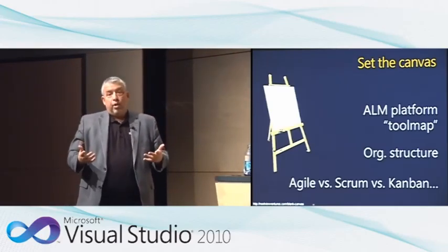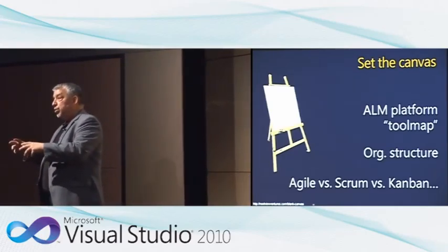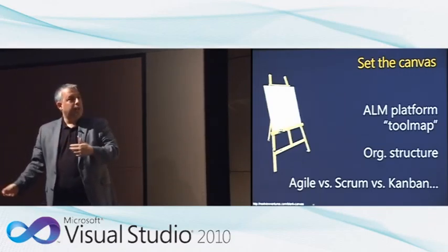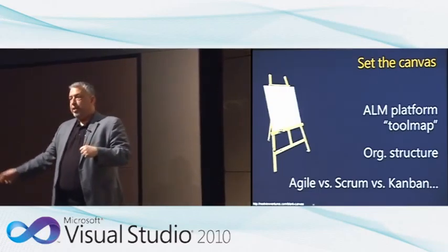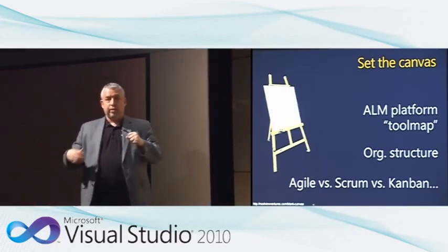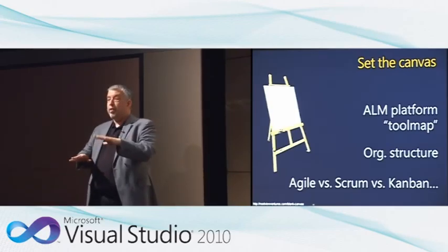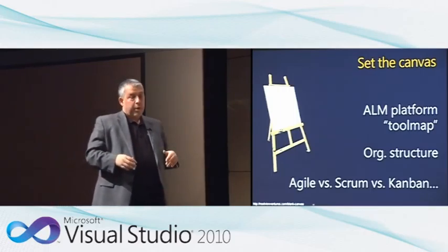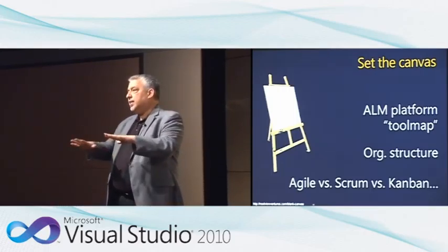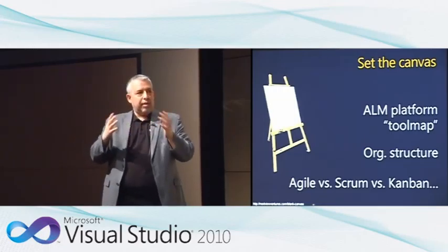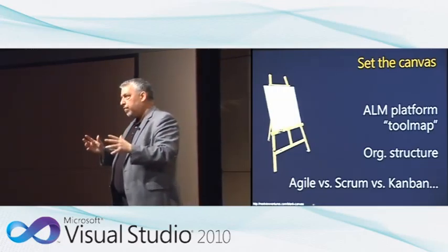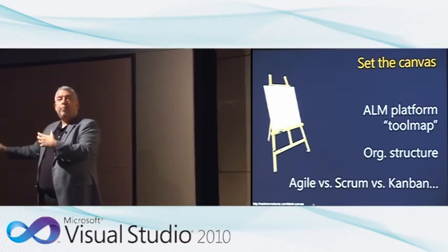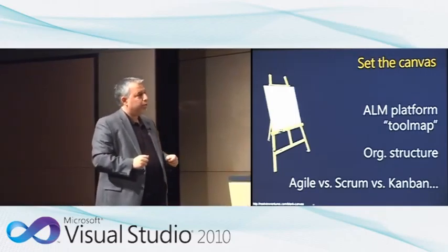And then you need to pick what basic process we'll use, not to do our project, but the process we'll use for the teams from a work management aspect. So are we using MSF Agile or CMMI, Scrum, Kanban, or whatnot? There's a decision that will affect a lot of the practices. Not all of them, not everything's touched by whether we're using Scrum or not, but a lot of them are. So we need to have that sense. And again, the key is a little bit like in Scrum: we need to decide at a high enough level so we can actually handle the changes once we implement the different improvement items that we go forward with.